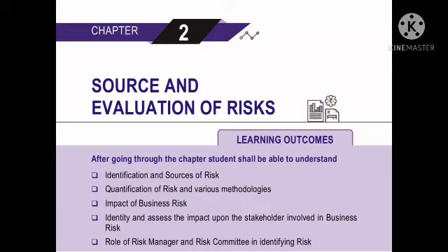Analyzing the level of risk: to analyze risks, we need to work out the likelihood of its happening, frequency or probability, and the consequences it would have, the impact, of the risks that are identified. This is referred to as the level of risk, and can be calculated using this formula: level of risk equals consequence x likelihood. Level of risk is often described as low, medium, high, or very high. It should be analyzed in relation to what is currently being done to control it. Control measures decrease the level of risk, but do not always eliminate it. Example: a risk analysis can be presented in the form of a matrix, such as this: likelihood scale.